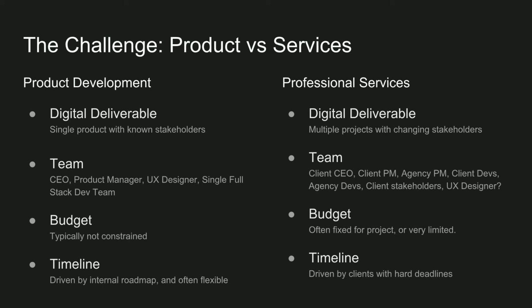In budget, in a product, not to say that there is unlimited budget, but it's not as controlled. It's not so controlled in terms of saying, okay, for that feature you have X amount of dollars, and everybody's doing a timesheet, and you cannot exceed that. Which is what you have normally on the agencies. The client either agrees to a fixed rate, or they're hourly, but they're not going to appreciate all these overages over a design sprint. So those are challenges that you have.